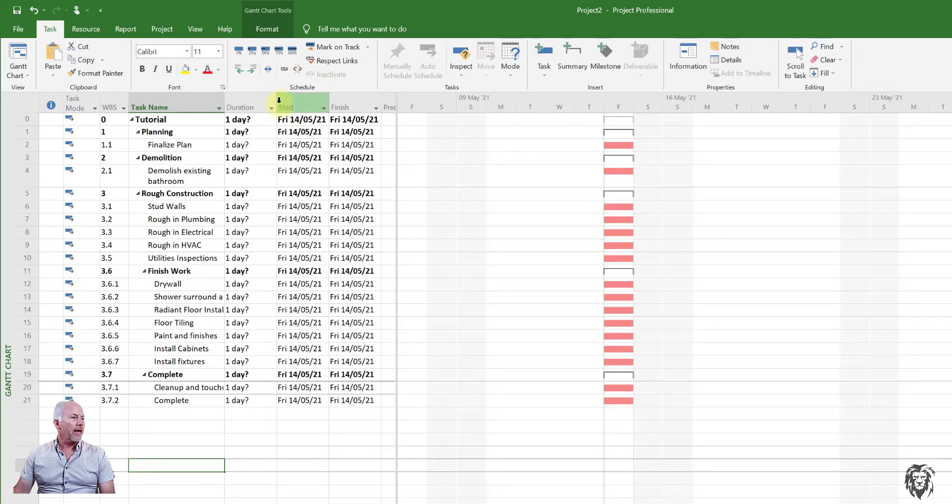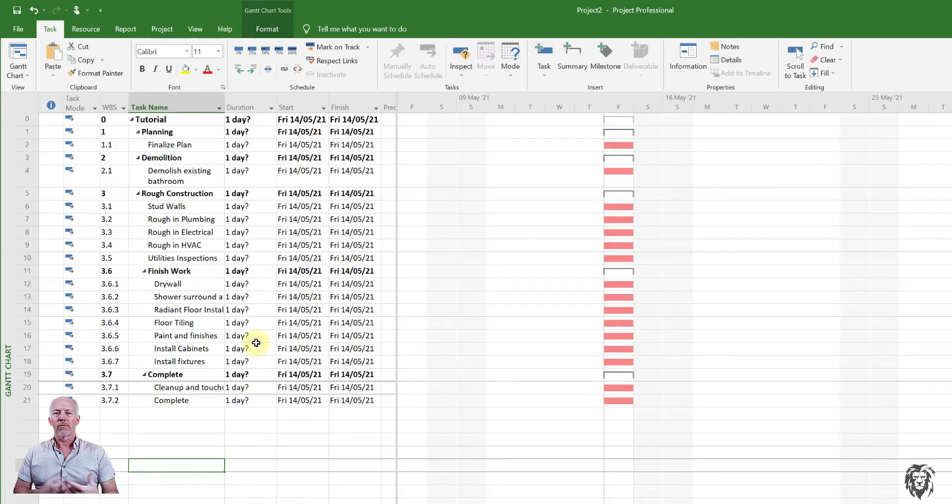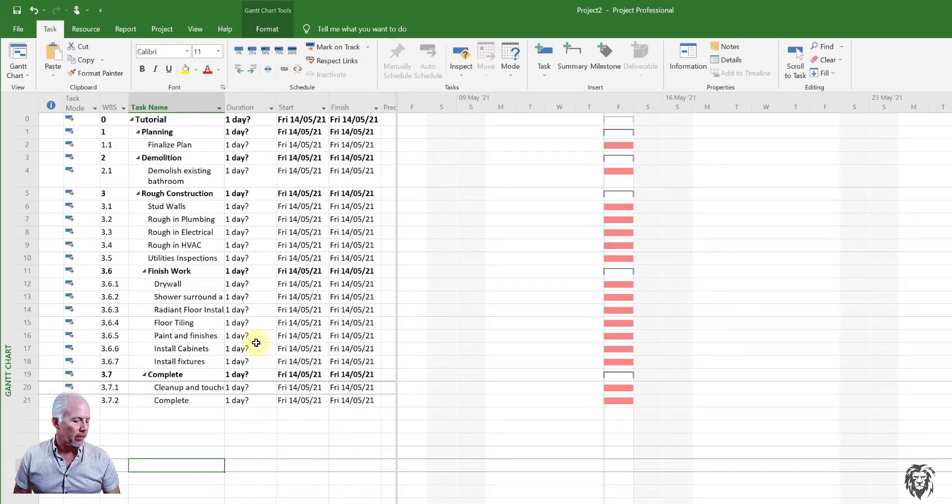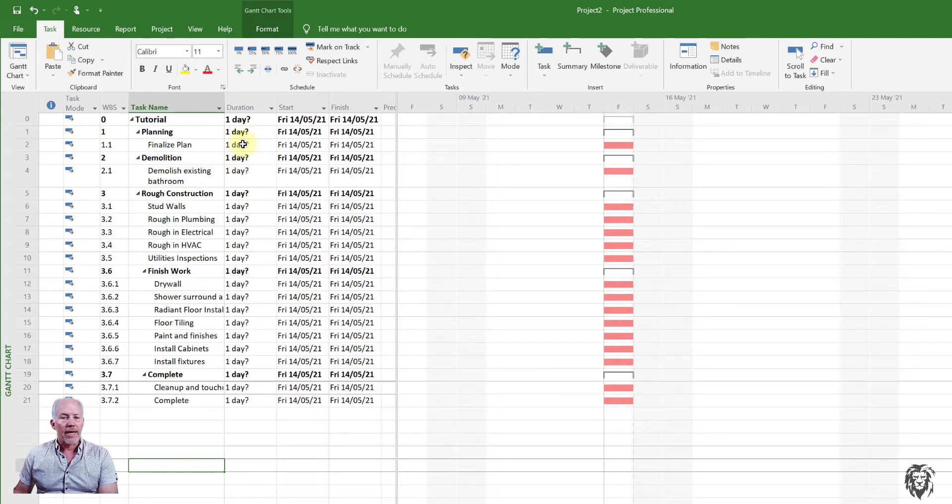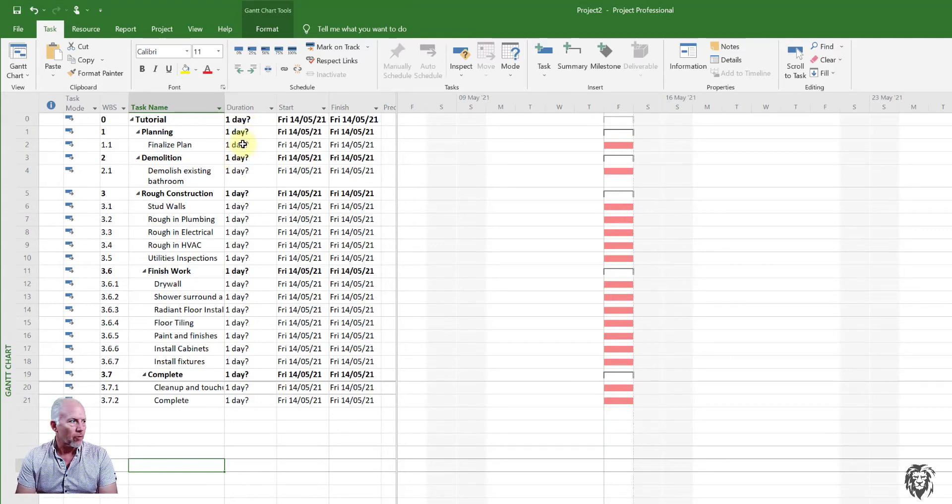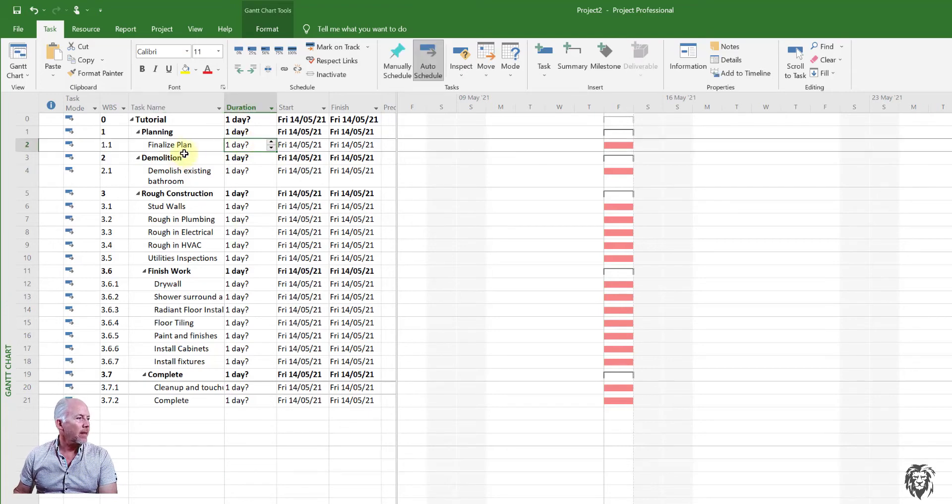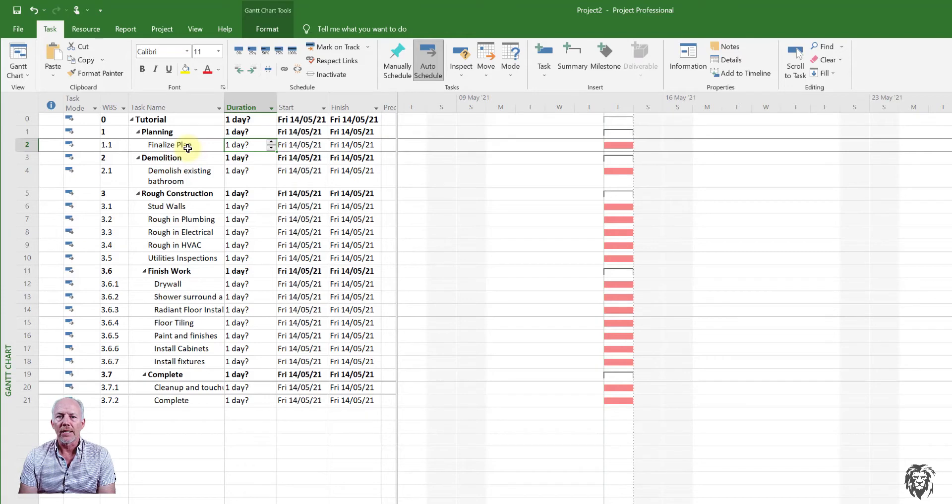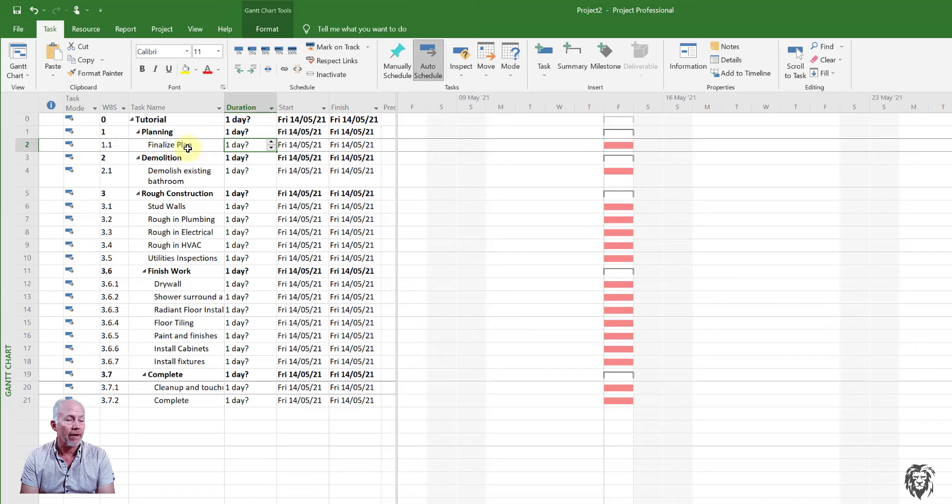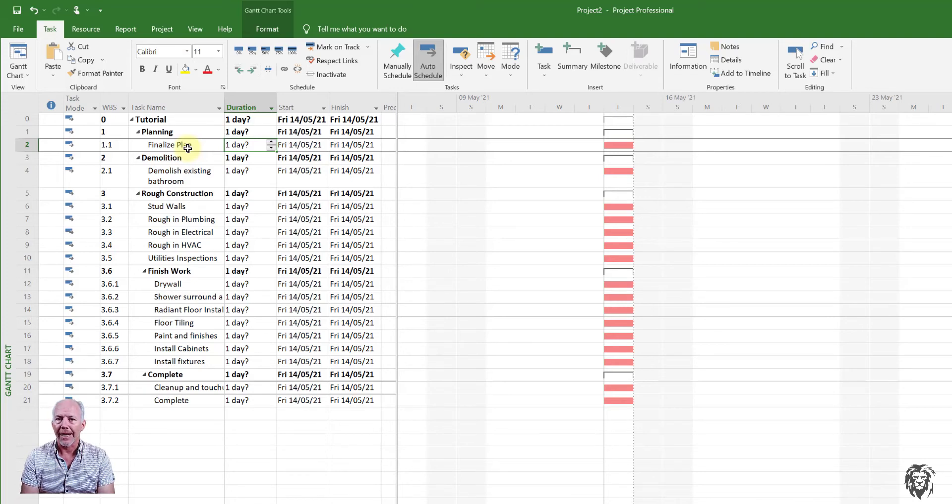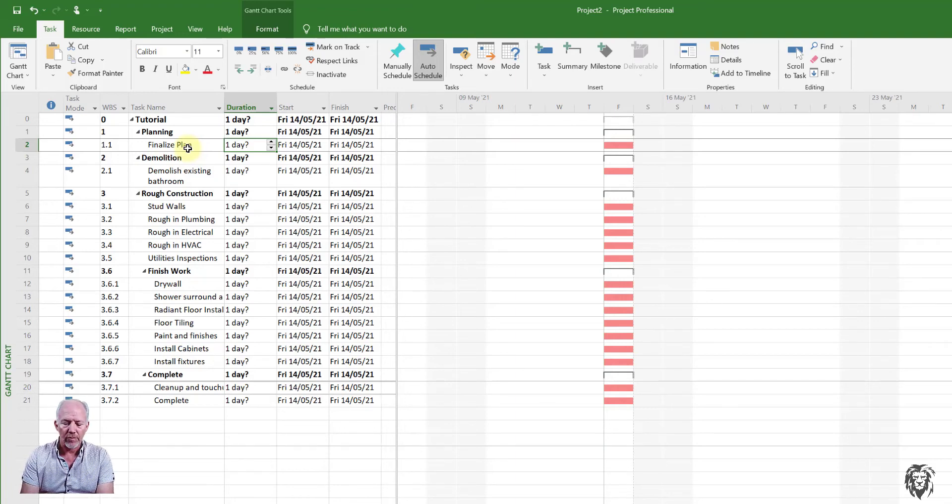And we have all of our projects. Now, because we haven't entered in any durations, they're all showing up as one day question mark just by default. And so we'll start to enter those durations. So for summary tasks, we don't enter the durations, those are calculated by the program. So we want to go down to our first task, and it's finalized plan. And so obviously, whether you're doing a bottom up estimating process, or whether you're doing the estimate yourself, you're going to have to arrive somehow at an estimate for the duration.